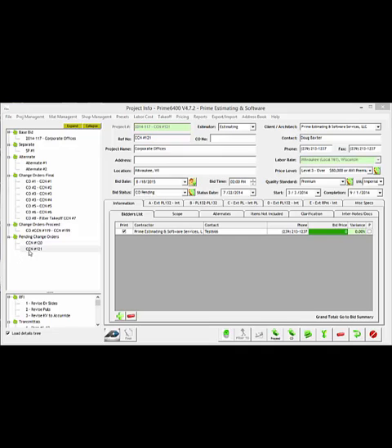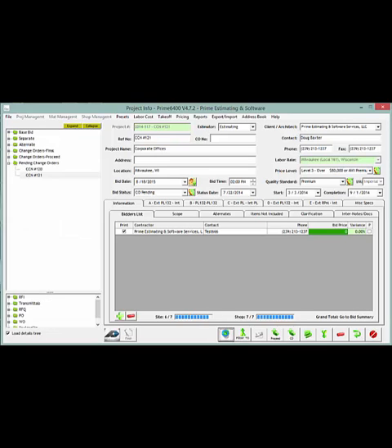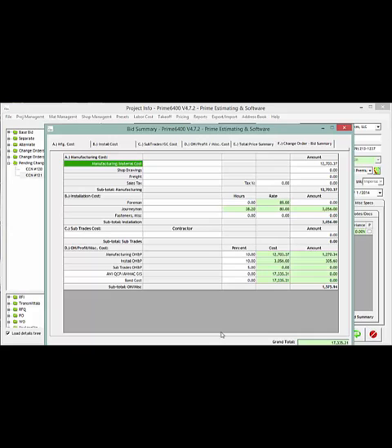We're still in change notice number 121, and now we would come back and do a bid summary. So what we want to do is to add the percentages and the fees onto this estimate to be submitted to the contractor. So typically, the top line is your manufactured or material cost that comes from your takeoff that we just performed. So that's the value that's been brought forward.